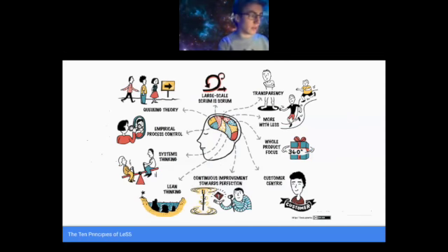And that brings us to the core 10 principles of LeSS. The LeSS framework is entirely founded on these 10 principles. We won't go into all of them, but one we will touch on is more with less. More with less means it's discouraging a lot of things that we typically find in corporations, such as handoffs, preparation sprints, stabilization sprints, dependencies, separate architects, and separate backlogs, to just name a few. We're really trying to accomplish more with the bare bones minimum of what we need to get done.